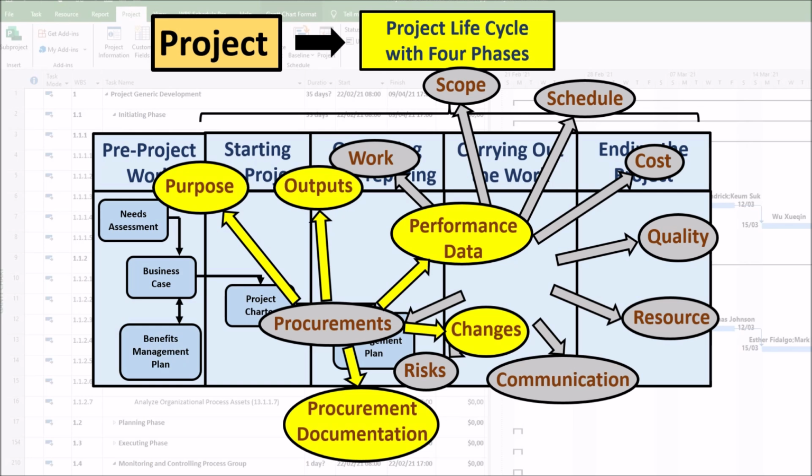Procurement documentation. At this stage, the procurement documentation that may be updated includes: 1. The contract with all supporting schedules, requested unapproved contract changes, and approved change requests. 2. Any technical documentation developed by the seller. 3. Other information such as deliverables, seller performance reports, and warranties. 4. Financial documents including invoices and payment records, and the results of inspections related to the contract.